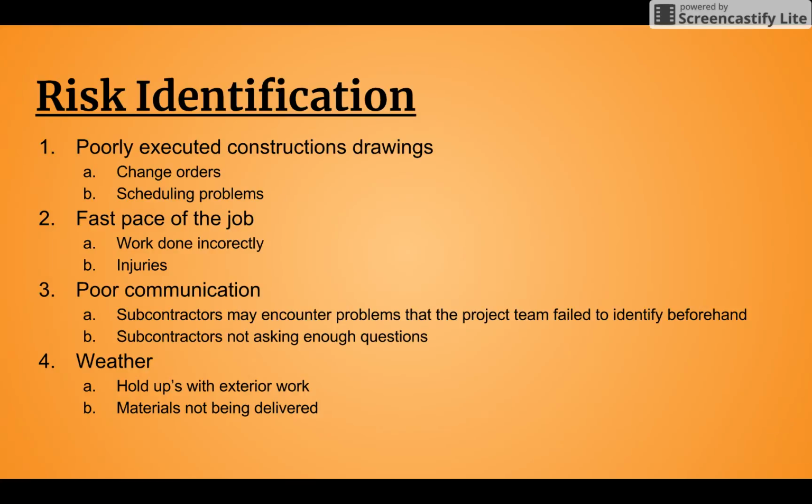But the fourth risk is the weather. With the exterior work that's being done on this job, the site work, the installation of the 20,000 gallon septic tank, and all the utilities going from the road to the building, that can slow things down with the other trades, with the plumbers mostly, and that holds things up a lot.